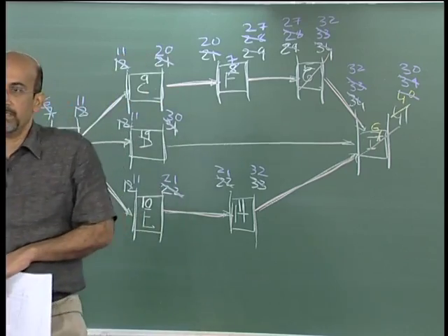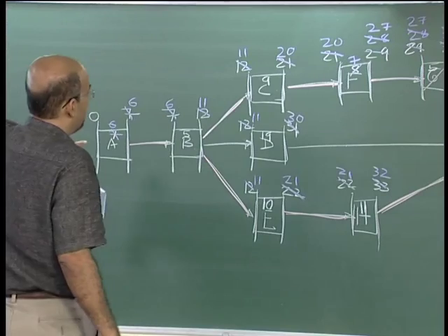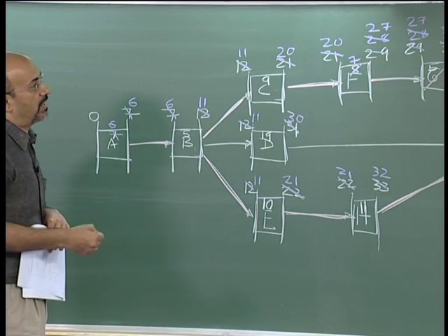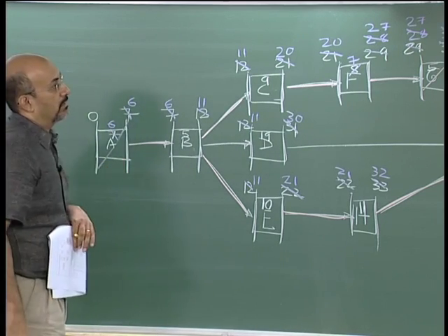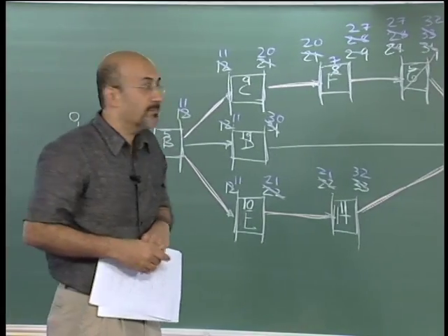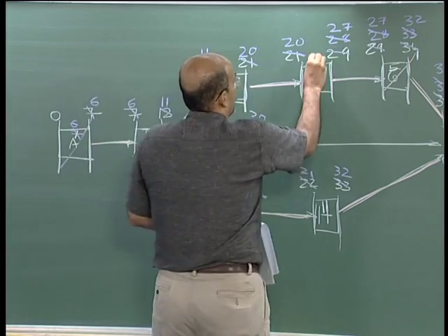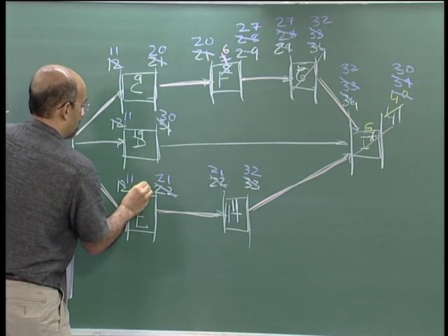Okay, any change in critical path? No, because it was an activity A that moved, it is predecessor to all of it. Okay, so now we have actually crashed A also to the max. What are our options now? F and E. Okay, so in the next option it is F and E, so I'll have to move F to 6 and E to 9.